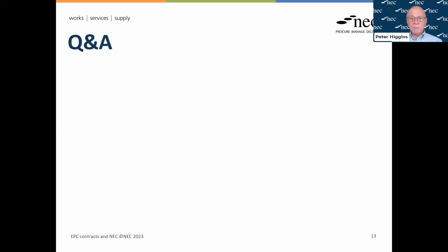Shai, your experience in terms of that, do you get a lot of information? I agree with you, Peter. It's not a lot of information, but it's also the nature of the information. And that's where it is different from designer built, I guess, because it is a full risk transfer. And because we're looking much more at an output specification, rather than the client doing, say, an initial design, which is to be developed and completed by the contractor, what the client provides are some of the basic constraints, the size of the site, that affects design, and there's not much you can do about it.